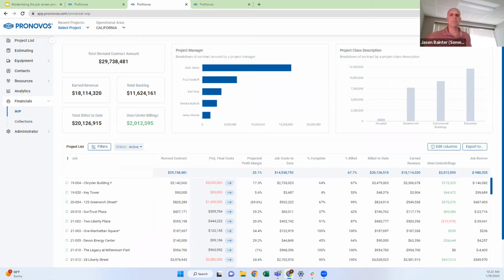And in past webinars, we've seen the money graph, or the cash graph, and that gives you a timeline of when costs have come in, when cash has come in, and when billings have gone out. As long as we are seeing cash come in at a faster pace than costs are going out, then we're going to be cash positive, and the client will be cash flowing that job versus the company having to cash flow it.